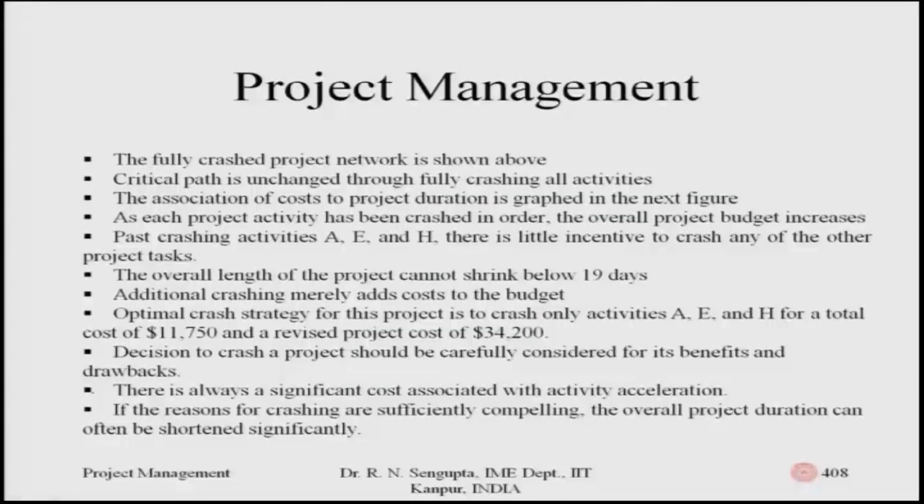The overall length of the job cannot shrink beyond 19 days, because as mentioned here the number of days are accordingly mapped. The additional crashing merely adds cost to the budget. So, if you want to crash the job further than the number of days mentioned here in the bullet point, which is 19 days, you will basically incur more cost without any added advantage.